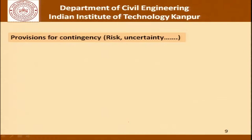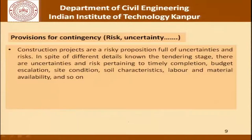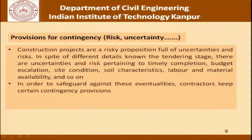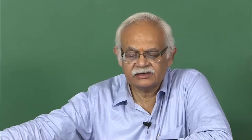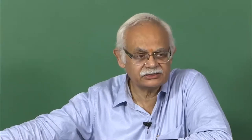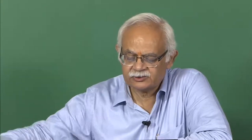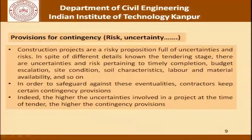Coming to provisions for contingency — risk and uncertainty. Construction projects are a risky proposition full of uncertainties: timely completion, budget escalation, site conditions, soil characteristics, labor and material availability, and so on. Contractors must keep certain contingency provisions as part of the markup pool. The higher the uncertainty at the time of tendering, the higher the provision for contingency. Importantly, if the contract is drawn up so that risks are more fairly shared and greater protection is afforded to the contractor, contingency provisions can actually be brought down.